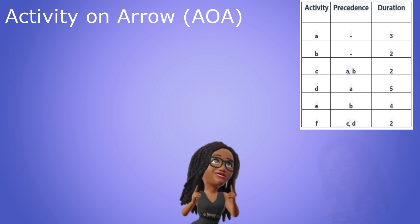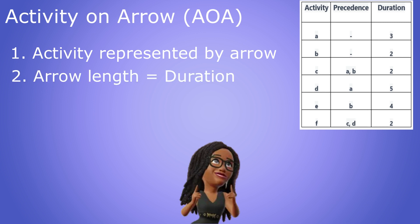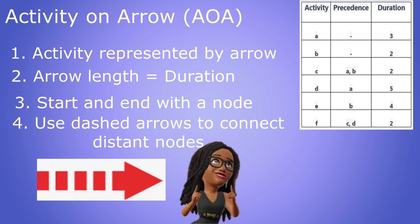When drawing our activity on arrow network diagram there are four main things to consider. One each activity is represented by an arrow. Two the length of the arrow can be used to represent the duration. Three each activity starts and ends with a node. Four we used dashed arrows to connect points that are logically connected but not spatially connected. You'll see what that means when we draw our network.